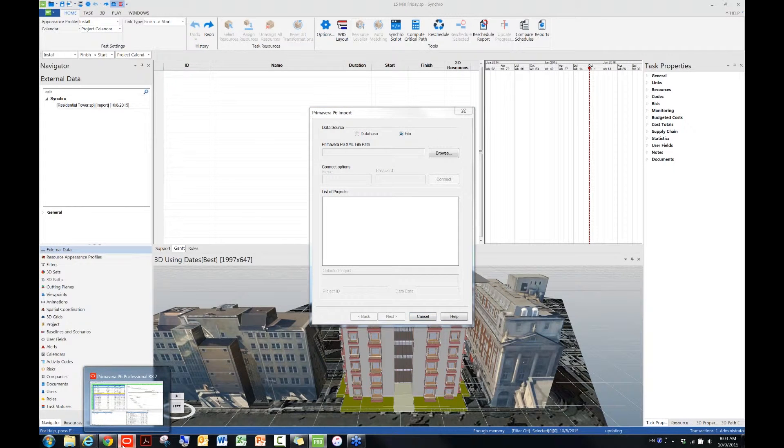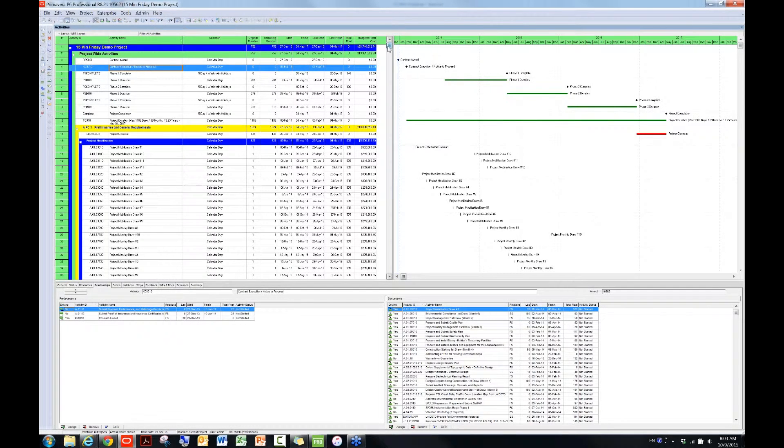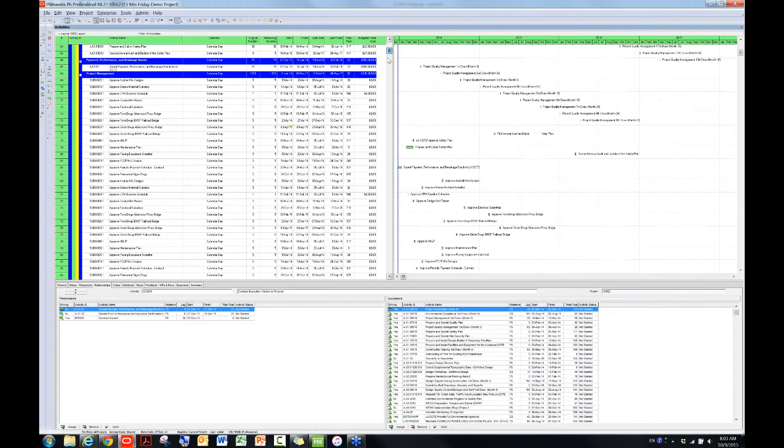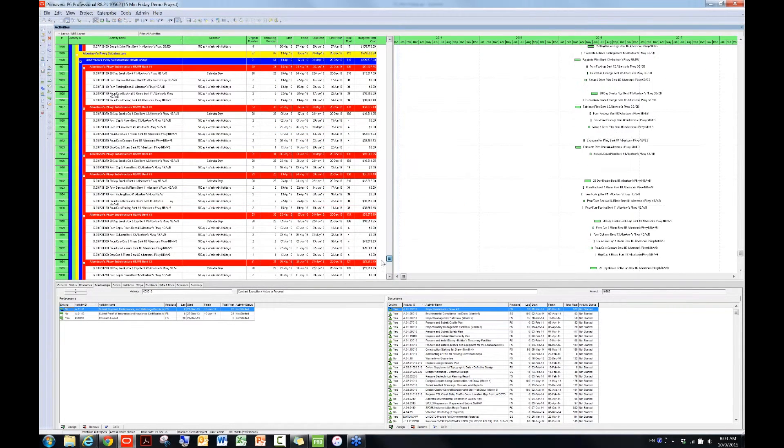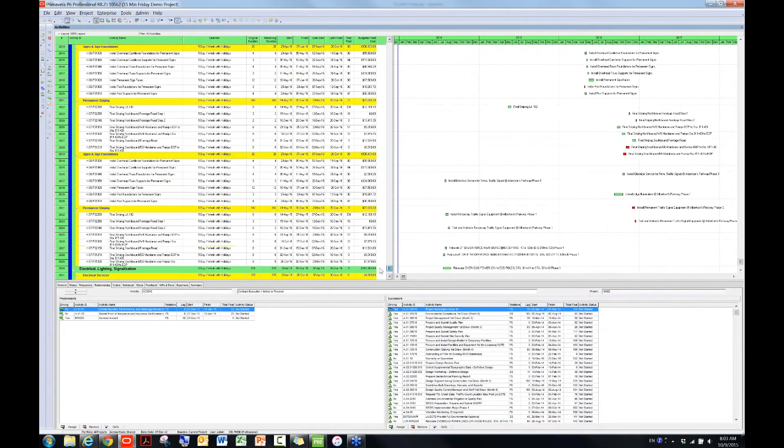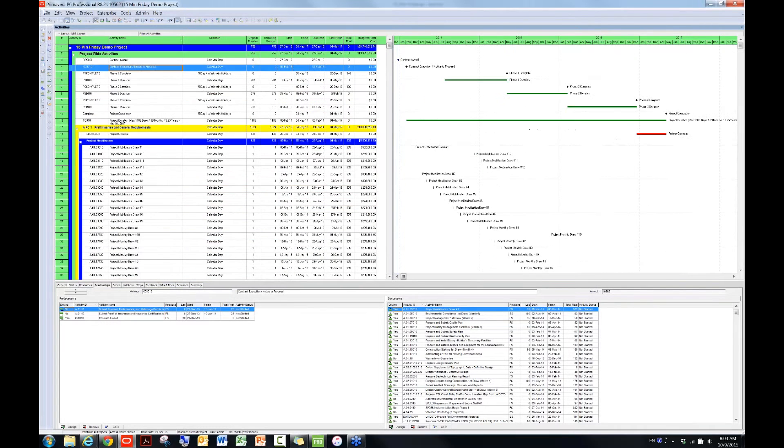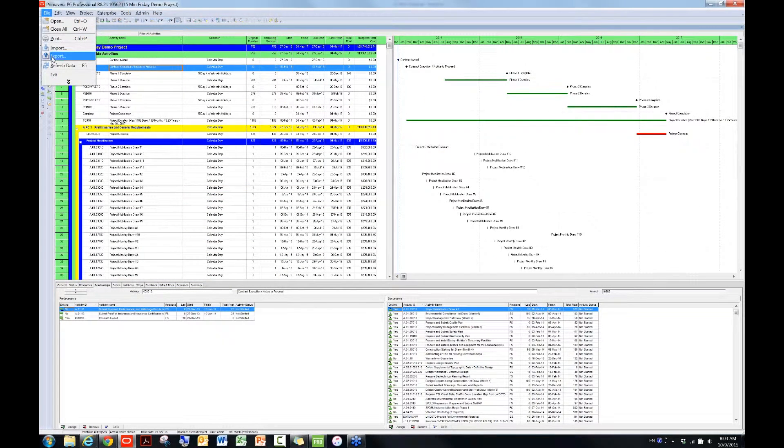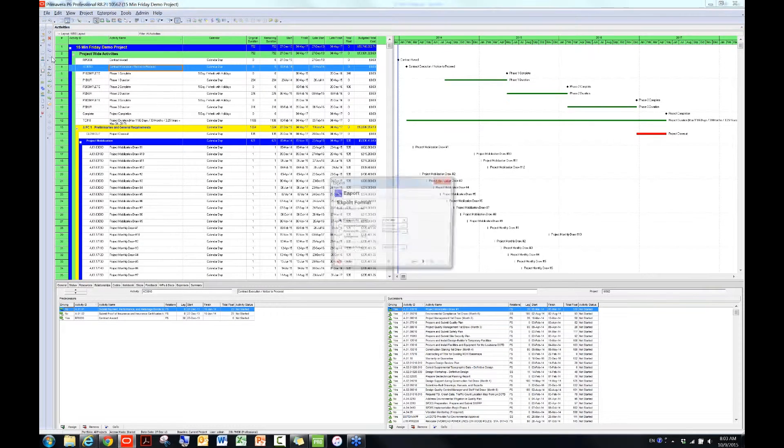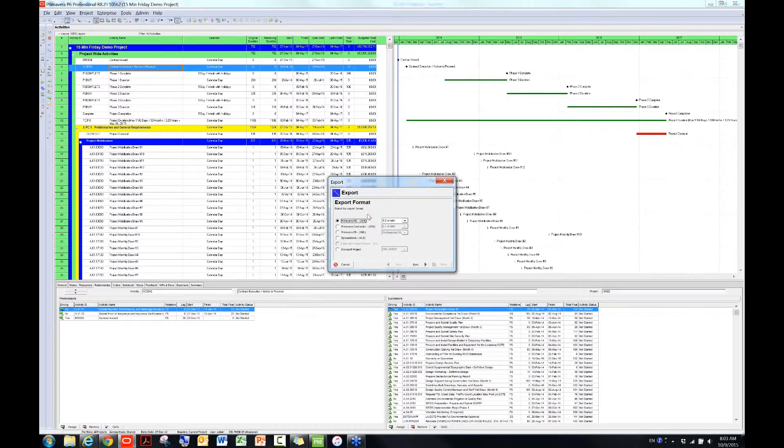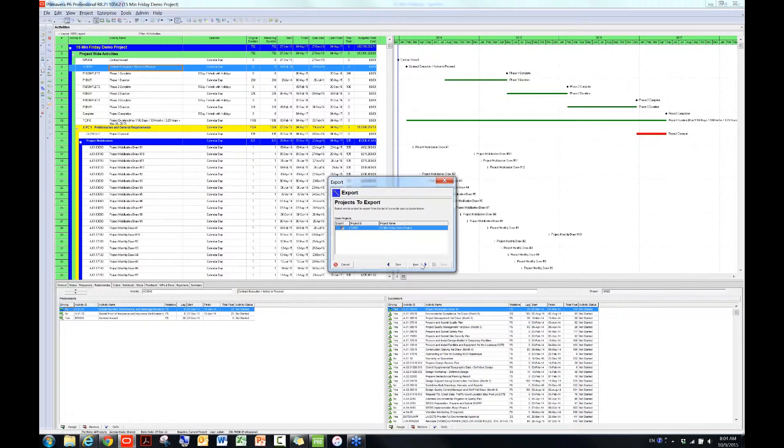This is a schedule that I prepared for this webinar. You can see that this schedule has probably more than 2,000 activities. So what I need is to go to File and then click on Export. In this window here, make sure you choose the third option from the top, which is the P6 XML, and then you can click on Next.